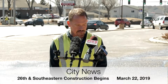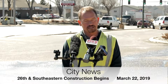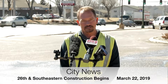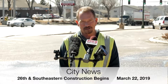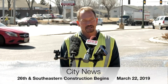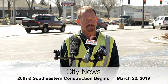Dina talked about our schedule for next week, depending, of course, on the floods, but we plan on switching everything on Monday. So there'll be head-to-head traffic from Yeager Road to Southeastern. Southeastern stays open. Yeager Road stays open. The on and off ramps northbound will stay open. The only limits are that you're going to be head-to-head on the north side of the road. And obviously when you're head-to-head, we're going to be at 2 less lanes of traffic, so we're going to try and put everybody into 2 lanes.